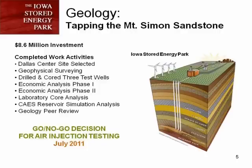The short story is, there was enough sandstone. The cap rock above the sandstone was sound. The sandstone had enough pores in it, but the connectivity between the pores in the sandstone, or permeability, was insufficient, so the project could not go forward.